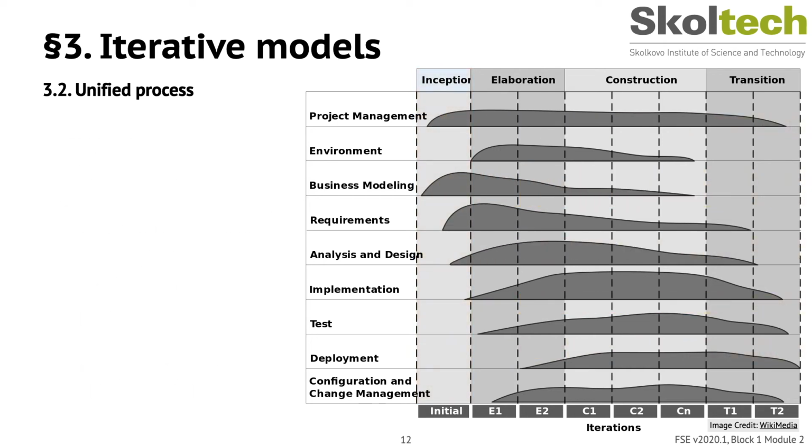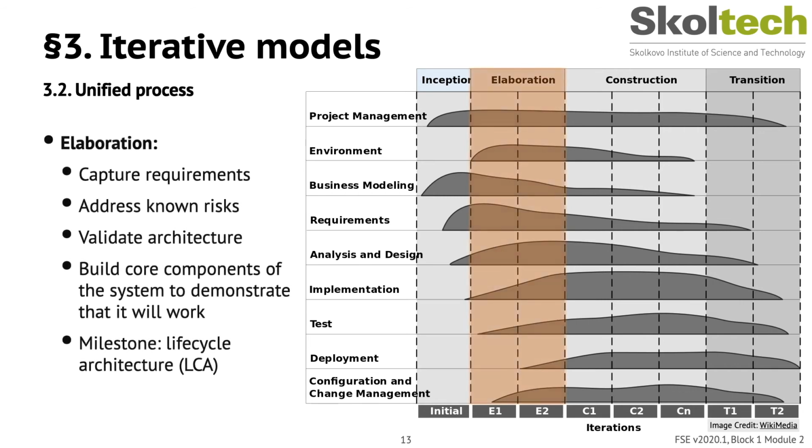During the elaboration phase, you create the project requirements. You build use cases, architectural diagrams, and class hierarchies. You need to specify the system, but you still don't want to restrict developers with unnecessarily detailed requirements. The main goals are to identify and address risks, so that the project doesn't fail later.